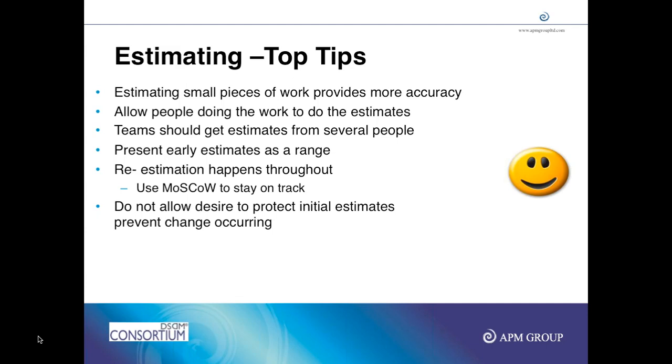But then how soon in a project are you able to give an estimate? During outline planning, you give a very high level estimate like 6 months or $1,000 or $10,000, and it could be between. So general good practice in companies is to give some range. Like I can say it can take 5 to 6 months, and it can take between 10 to 20,000 pounds. So you have a range for cost, and it can take about 4 to 5 man months of effort.